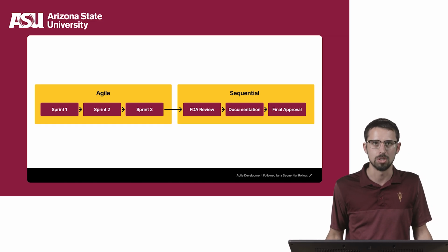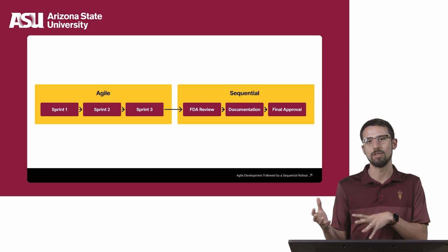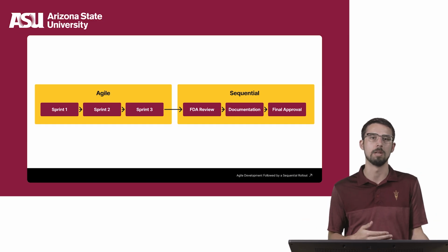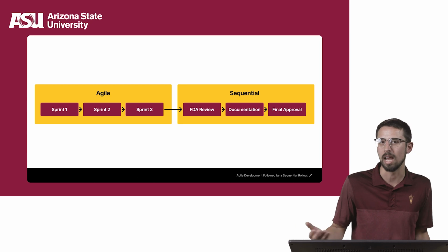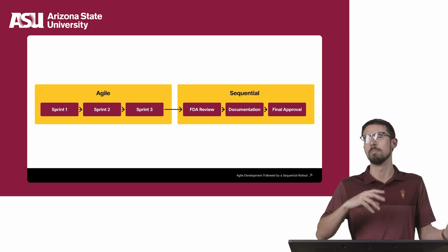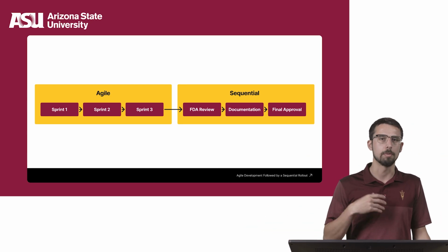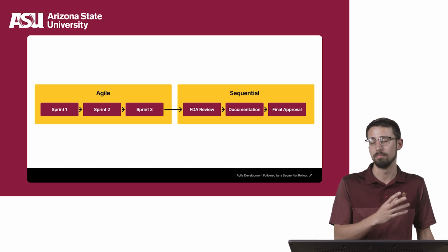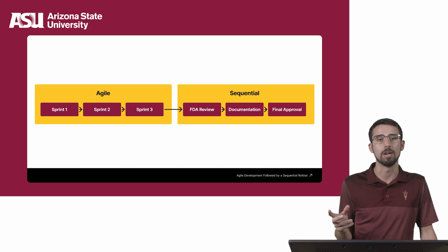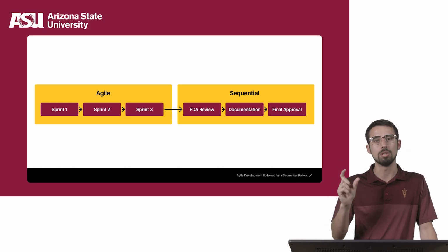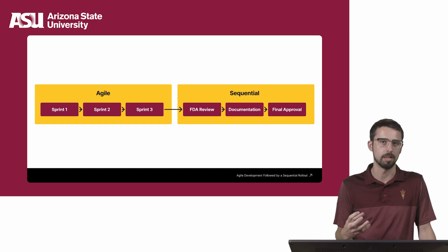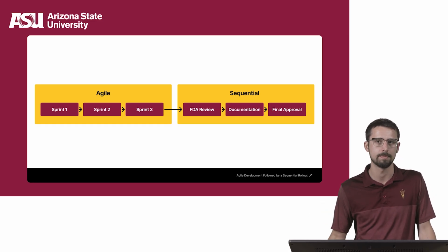The short version of the story here is that because FDA approvals are required to be completed at the end of the development process or repeated after any change, including even the most minor change, the process had to remain at the end as a separate phase. However, the consultant created some useful quick start guides and testing protocols that shortened the final FDA approval process.